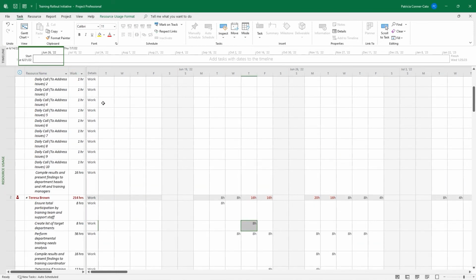You would need a paper and a pencil. You would need to go look at the resources calendar before you do anything. And it would go something like this. Now, we're not going to do it this way, but I'll explain it to you. So I'm going to look at that first day where she has an over allocation, that Thursday. So she has 2 tasks that are 8 hours each. And what I'd have to do is take one of those tasks away from her on that day by making